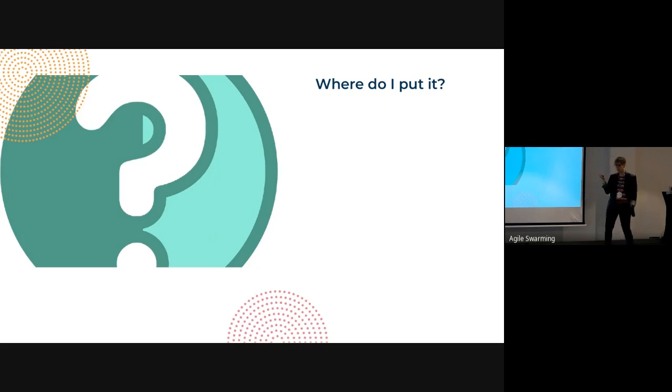What I've learned are two things. First of all, the teams really need to have a place to put the topics whenever they arise. I know that we are talking a lot about continuous improvement, but sometimes there are problems that can actually wait. They are not urgent to discuss. We can wait for the retrospective time. It's just important that we don't forget about them because they are still important. And another thing I've learned is to actually ask people at the beginning of each retrospective, what is the most important topic you want to discuss? Are we going for this whole format, or do you have something else you really want to take out of this retro?